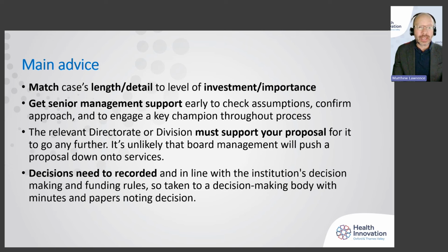And if a decision is going to be made, it needs to be recorded. This is a public sector thing. Probably most organizations have this as well, outside the public sector. It needs to be recorded in minutes with a paper that says it was done by the right body at the right time. They said yes to go ahead, and they approved it in that timescale with that money. They put it down in minutes, and they have the papers, ready to show to an auditor or to someone else if they need to check. So that's the broad general things about how a business case gets developed and produced.